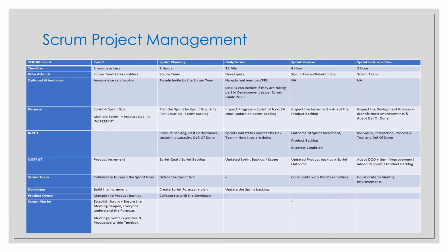The product owner is one person, not a committee, not a group of people, only one person. The product owner may represent the desires of a committee, a CEO or the stakeholders of the product backlog, but those wanting to change a product item's priority must go through the product owner.